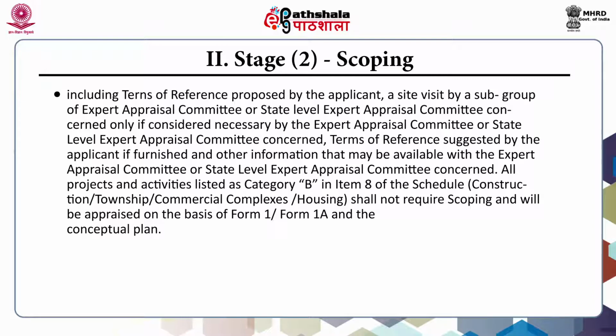All the projects and activities listed in category B in item 8 of the schedule, that is construction, township, commercial complexes, housing, shall not require scoping and will be appraised on the basis of Form 1 or Form 1A and conceptual plan.